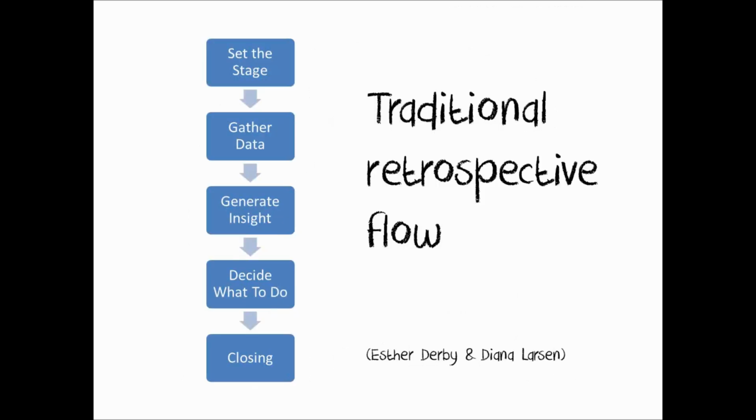First of all, what is the state of the art of retrospectives? I assume that most of you participating in this Bathtub conference have some experience with retrospectives, and that most of you know the traditional retrospective flow from Esther Derby and Diana Larsen, which is setting the stage, where you welcome everybody, make clear that everybody has a voice, and lay down the rules for the meeting or the working agreements.